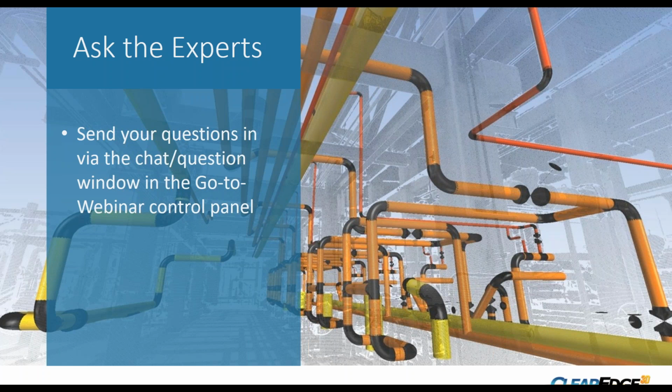Yeah. I didn't mean to put you on the spot with that question, Tim, but there's no doubt that Verity and laser scanning have the potential to be great risk mitigation tools. Kelly, would you agree? Yeah. My answer would be that as a general contractor, if you're not self-performing and installing the work yourself, your obligation to the owner is to make sure that work goes in to industry tolerances and within reason. It's a matter of what is within reason. Does that align with the tolerances specified for the job? And then how do you navigate that with your subcontractor, knowing you have some obligation to disclose this information to your owner, and then set expectations right with the owner?